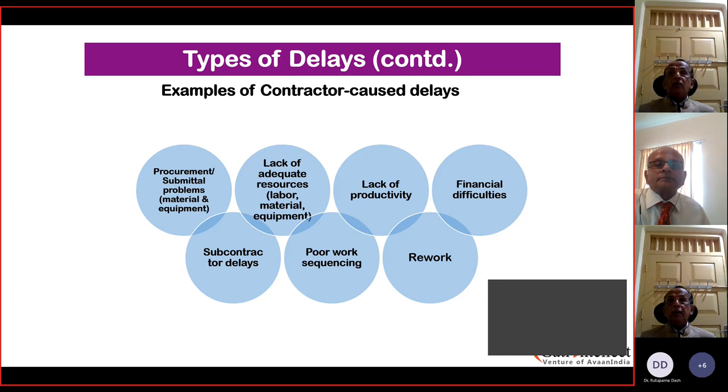Lack of productivity. Again, lack of productivity has to be very clearly mentioned in the contract. I would say it should be part and parcel of the SLA, where things have to be clearly explained. Like what Ram has just mentioned, what are the type of equipment which has to be mobilized, and manpower and materials, all these have to be available as and when it is required. If an additional work comes in, which has to be part and parcel of a change order, then there is an additional need for mobilization, which will be an additional cost. So in the contract, in the SLA, the contractor has to...